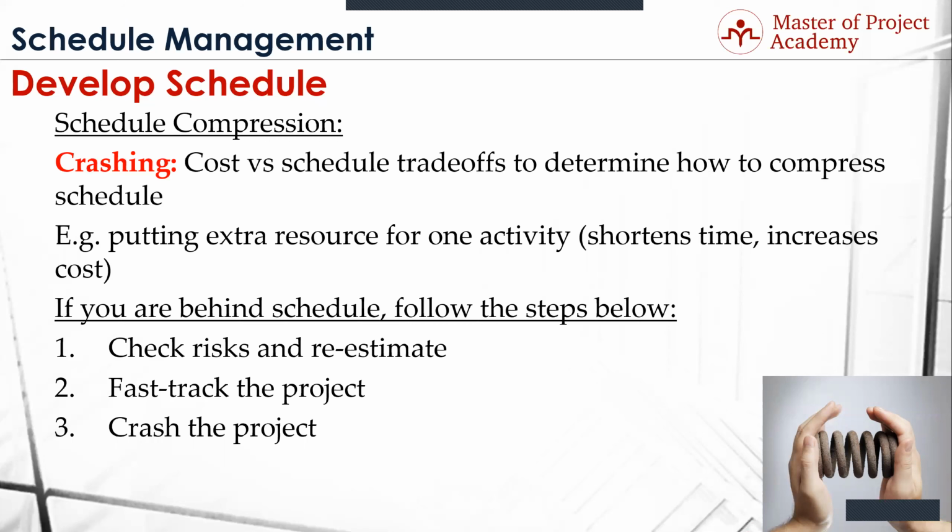And number 2, you always crash earlier than later. So if you have an opportunity to crash something and it's kind of early in your project, but you could also crash it later in your project, crash it earlier. That gives you opportunity to recover. And I'll take that back. There's 3 things. The third one is you only crash if it's on the critical path.